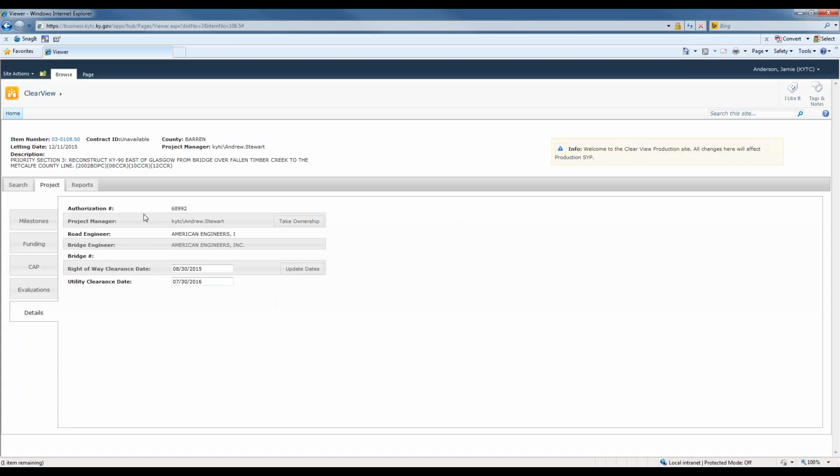Okay, the details tab. This is where you can view additional information on the authorization number, the project manager, the road and bridge engineer, and the bridge number, and the right-of-way and utility clearance dates. This is where you can update these dates. And I mentioned the take ownership. This is the button you can click to take ownership. So if a project has been recently assigned to you, this is where you go.